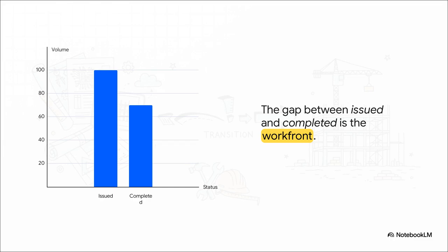We use the engineering workfront curve. Imagine you're looking at a tall blue bar representing the cumulative construction content on legitimately issued drawings. Let's say cubic meters of concrete we've fully engineered. Next to it, there's a shorter orange bar, and that represents what the site has actually completed. The physical shaded gap between those 2 lines is your workfront. It is literally the yard's oxygen supply. If that gap shrinks, your yard is suffocating.